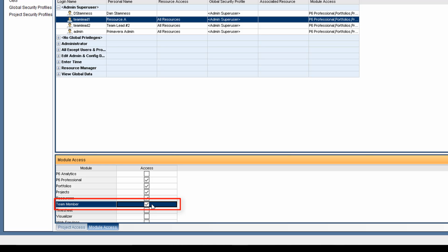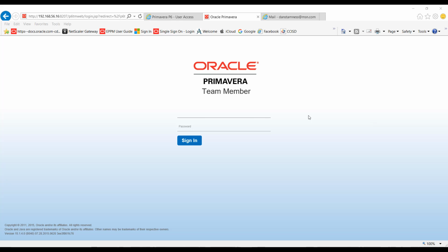Usually when I'm working turnarounds, I like to get status from anywhere from 15 to 20 team leads. I'm not a big fan of getting status from the companies directly. However, there are cases where the scaffold company probably has a lead that's watching over all of the scaffold builders, and I could rely on them to provide me the status. But when it comes to actually getting status for jobs during turnarounds, I prefer to see a coordinator that's in charge of all exchangers or a subset of exchangers, and that one person is responsible for updating all activities on that particular job.